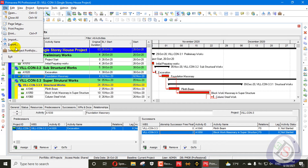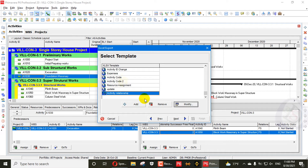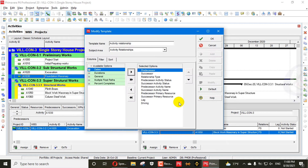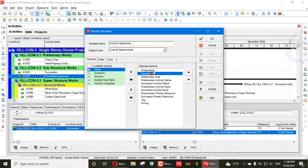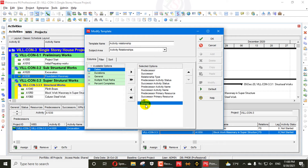I will go to File and export that file into an XLS file. Then I go to Activity Relationship and export that file. You can see Activity Relationship here — you can add a new activity relationship name and modify it. I have already created one so I won't create a new one. Predecessor, successor, activity relationship type, predecessor activity status, successor activity status — write those in. Also add lag and driving. Driving is a must.